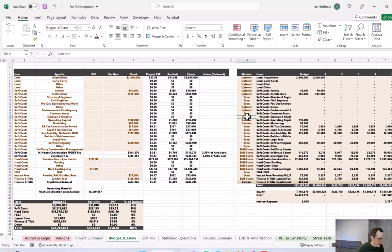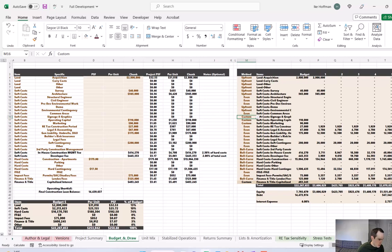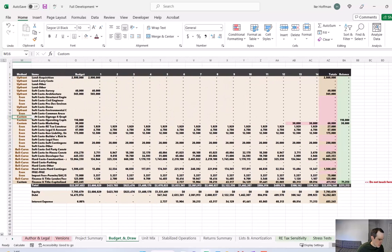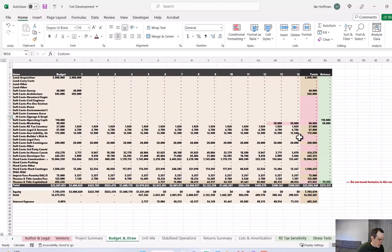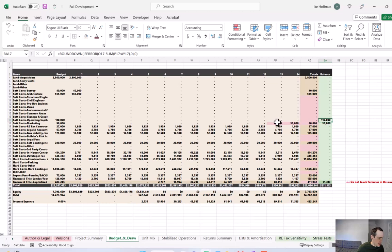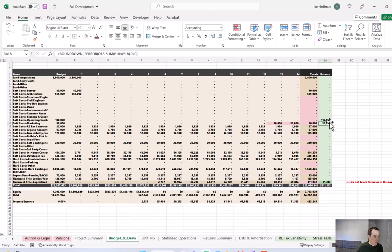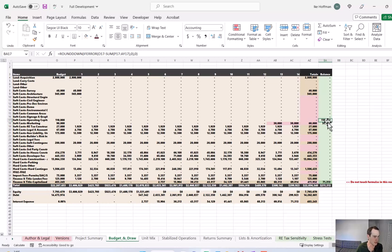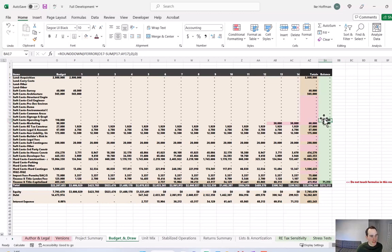So what's happening? Well, we have a custom election here under method and then I'm going to scroll all the way over and I'm not actually allocating this $110,000 anywhere in the construction period. You can see in marketing the row before, we have a $90,000 budget, I'm doing $30,000 in month 13, $30,000 in month 14 and I'm leaving $30,000 for the final marketing push once the property has a certificate of occupancy. But this $110,000 is never utilized. So these are funds that we can now draw on during the lease up if we're in a situation where revenue isn't sufficient enough to cover that construction debt early in the lease up timeframe.